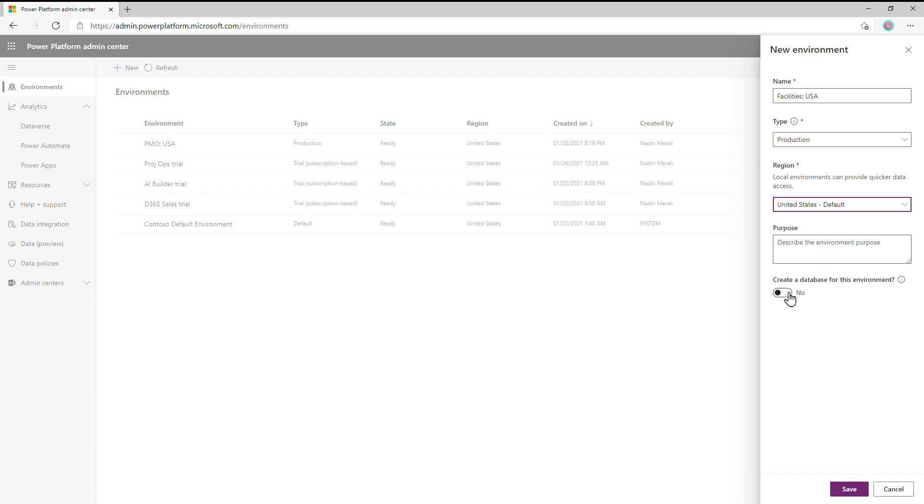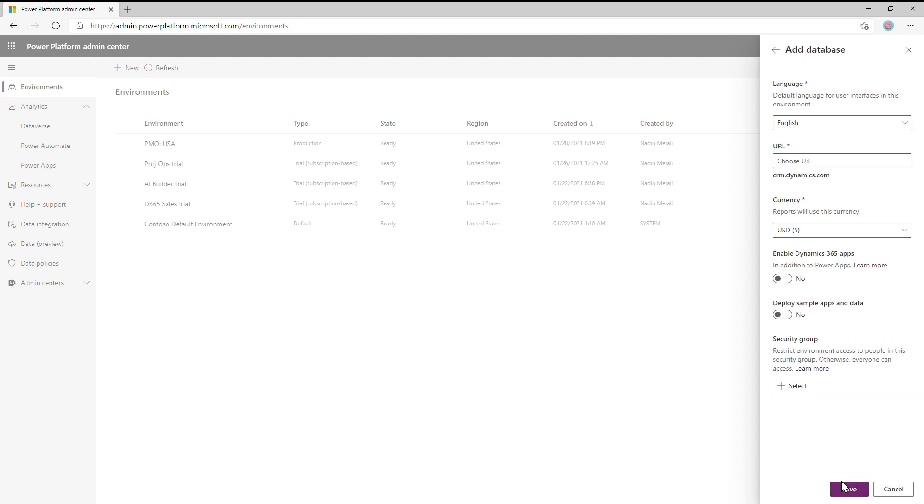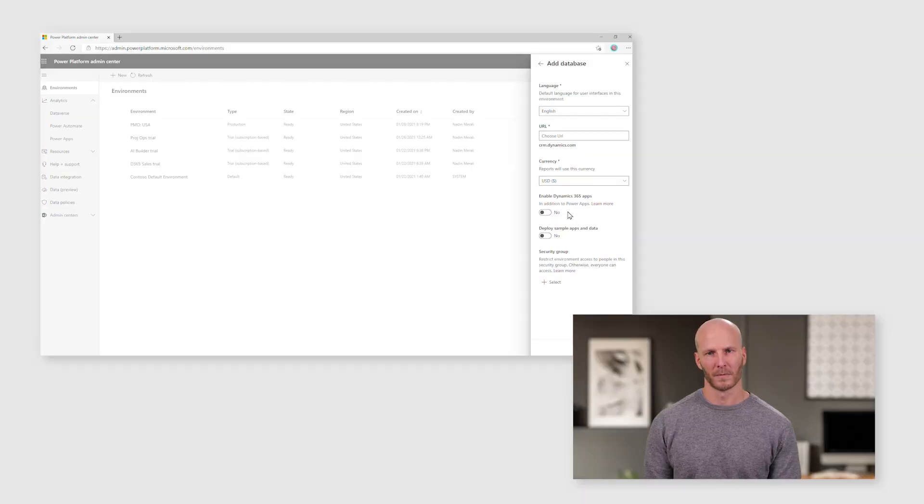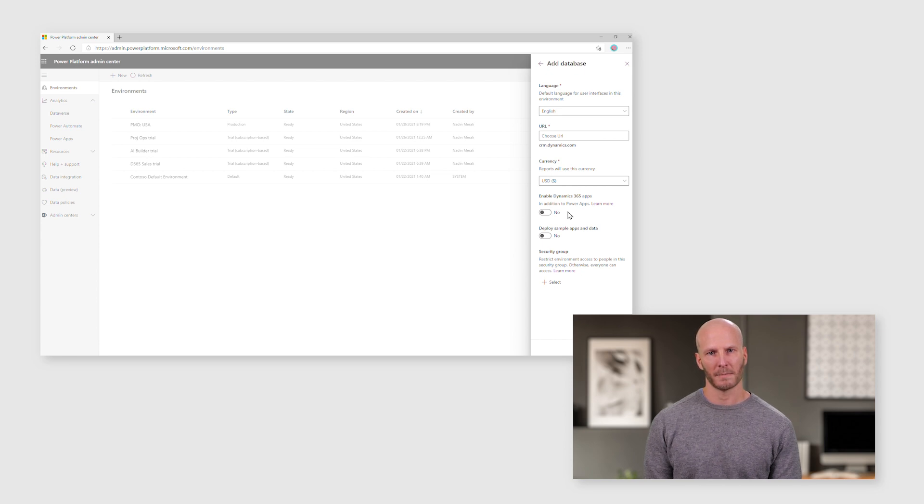This last step is important since we need to create a database where project data will be stored. It next asks us for information about the database. If we like, we can choose to give it a URL that is easy to remember, but it is not critical. There is one important setting on this page, which is this toggle here for Enable Dynamics 365 apps. This needs to be no, otherwise we won't be able to deploy a project.